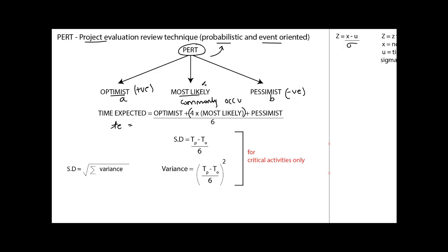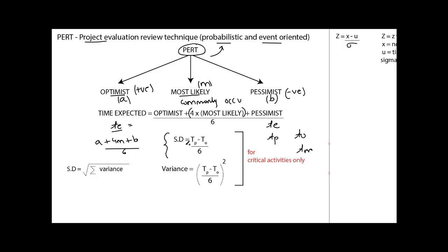In standard notation, optimistic is A, pessimistic is B, and most likely is M, so TE = (A + 4M + B) / 6. Standard deviation is given by (TP − TO) / 6, and variance is that quantity squared: ((TP − TO) / 6)². The overall standard deviation equals the square root of the sum of variances — the summation is over critical activities, which we'll see through an example.